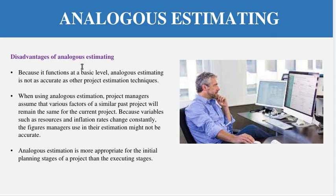Analogous estimation is more appropriate for the initial planning stages of a project rather than the execution stage. If you are using it at the initial stage, it's good. But if you use it during the execution stage — when software developers are actually developing modules — that is the wrong approach, because at that moment a detailed, drill-down level of estimation is required. It is better to use analogous estimation at the time of planning and it should not be used at the execution stage.